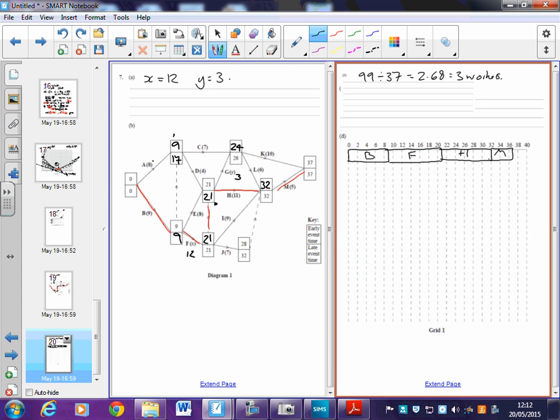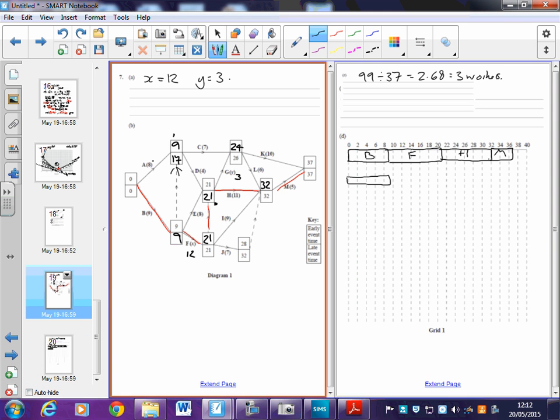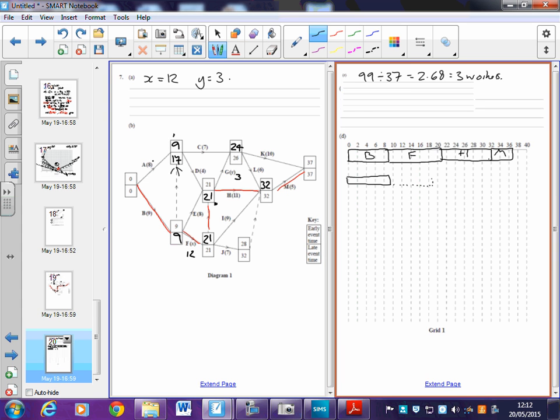Okay, after that, each activity just goes on its own line, and because it's cascade, remember you need to represent the float time on there as well. So, starting with A, they could start at 0 and it lasts for 9, so I draw a solid line from 0 to 9, but it doesn't have to be finished until this 17 at the bottom. So then I do dotted lines, or sometimes shaded lines in the answer book, just so you can see it a bit clearer. But as long as you've got some way of representing that, that was activity A.